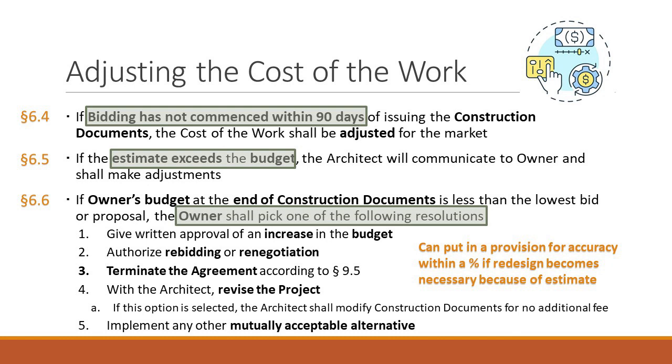Well, that was right after COVID. And so the architect, when we talked about how the fix was, they're like, well, we gave you the stuff in January. We went out in April, and COVID hit, which affected the construction market. So we can't be held to that budget that we gave you because life has changed. So that was a real-world application of 6.4, of what happens when things that can impact the market change the pricing.